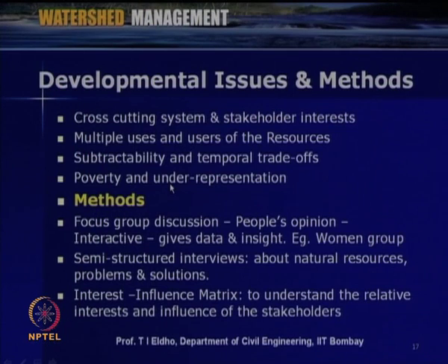Then as far as stakeholder analysis is concerned, various methodologies are there. So, some of the important methodologies are listed here. We can focus on various groups, like focus group discussion, where people's opinion can be sought. Then we can interact with various groups that may give data and insights. So, like the women group or the water user group or the farmers group. So, like that we can discuss the various issues with the groups. So, that methodology through the stakeholder analysis can be achieved.